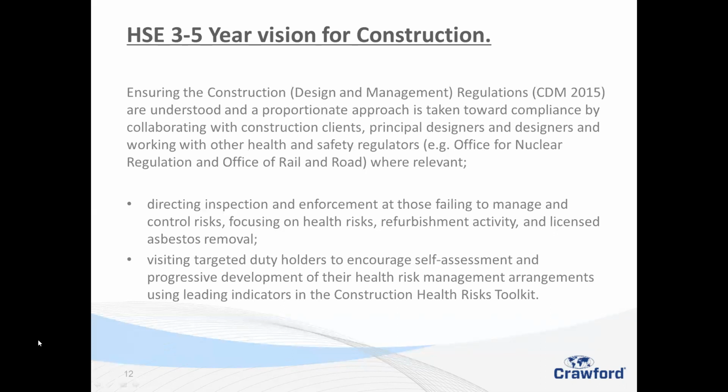When you talk about more than one contractor, does this include people that work for them, or are they self-employed? As we mentioned earlier, if anybody works for the principal contractor on a PAYE basis, then they are seen as a principal contractor's employee. As soon as they are self-employed in any shape or form, then they become a separate contractor.